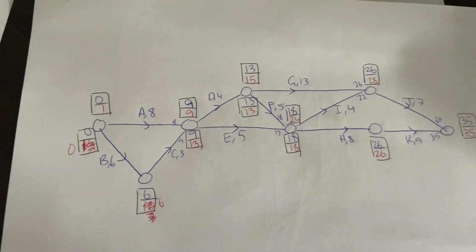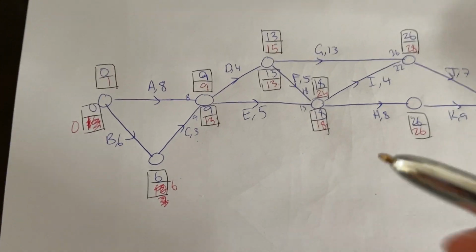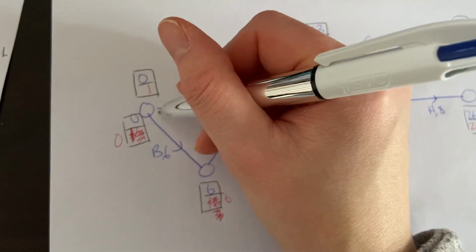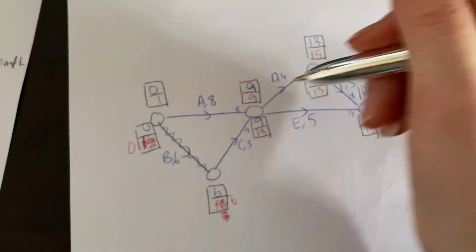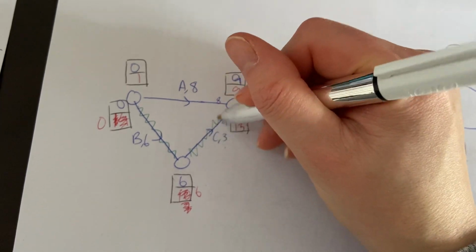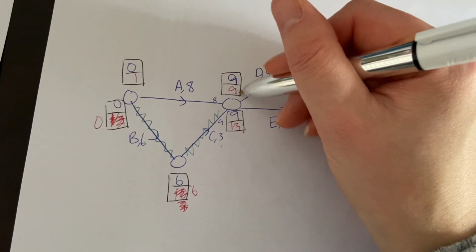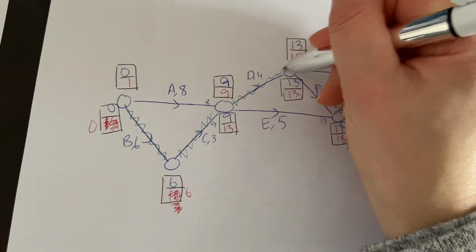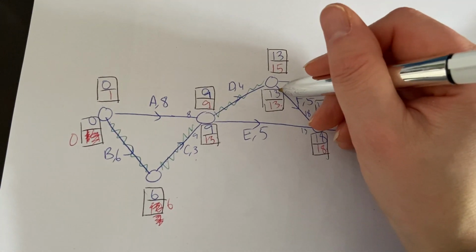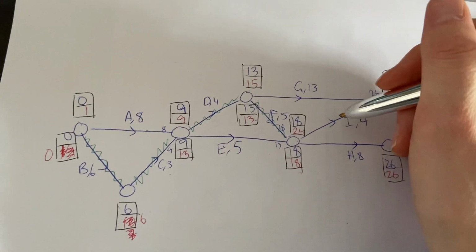All right, so critical path, let's use green. Our critical path has changed. So this is 0, 0 now, so that's for B. 6, 6, that's for C. This one here, the top one is for D. The top one is not critical, so that's for G, so then F is the critical one.